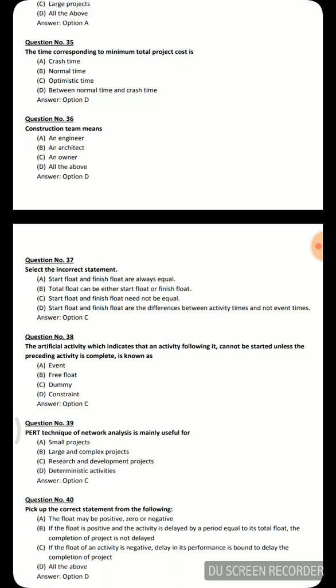Next question: Pick up the correct statement — Option A: float may be positive, zero, or negative. Option B: if float is positive and an activity is delayed by a period equal to its total float, the completion of the project is not delayed. Option C: if the float of an activity is negative, the delay in its performance is bound to delay the completion of the project. Option D: all of the above — which is the correct answer.